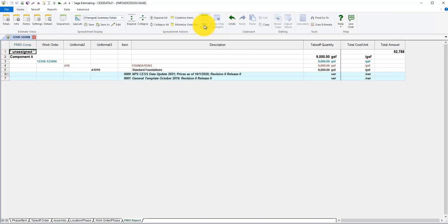And this button, when it's clicked, will show you the items that contain those subcontractor bids. Same with show highlights only. We don't expect you to take advantage of the individual item factoring capabilities. CESS is designed to apply a single park location factor as a factor table to every cost category and every item in your estimate. If that's not done, the estimate will not pass validation.